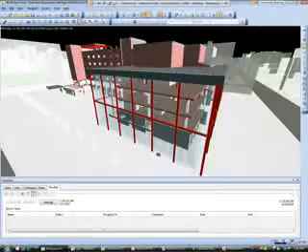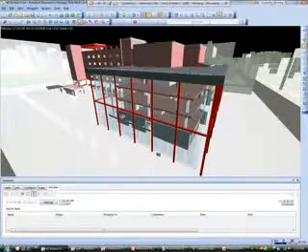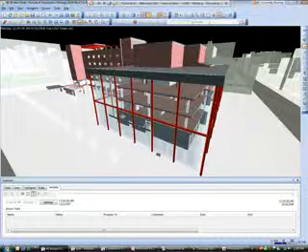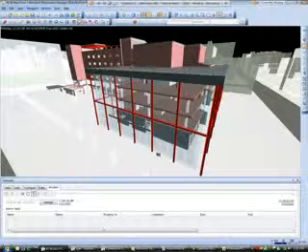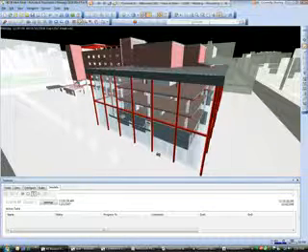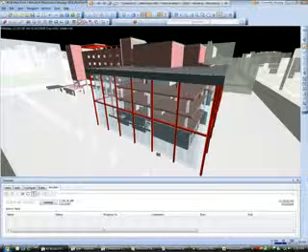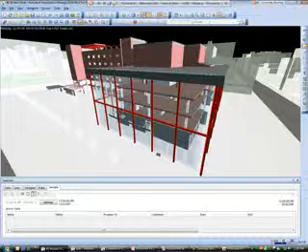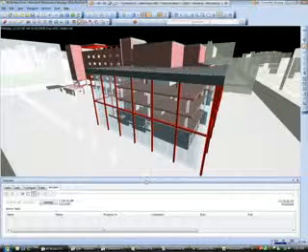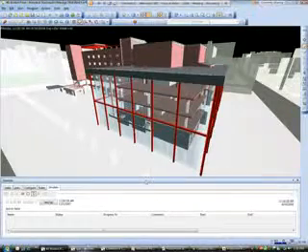Up to this point, we've been using just the Timeliner module, which allows us to bring in not only schedule data, but also link in animations and different task types. One of the other features inside of Navisworks is what's called the Clash Detective module. This allows us to look for not only physical clashes between components, but also soft clashes. So this next part of the demo, I want to talk a little bit about areas where we have two objects that are going to occupy the same space but at different times. I kind of alluded to that earlier when we talked about time-space conflicts.